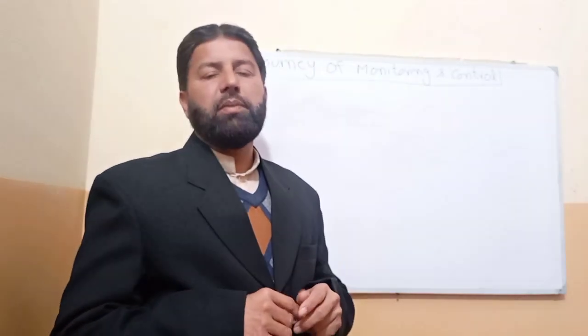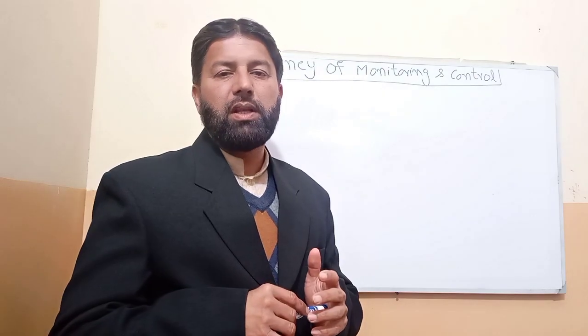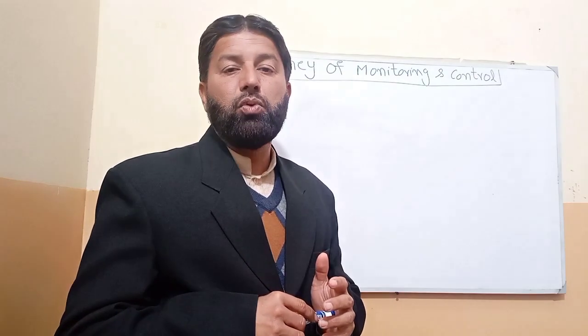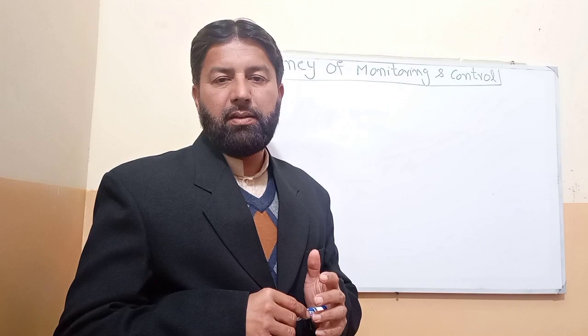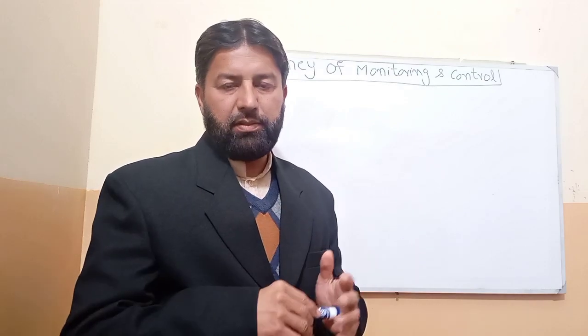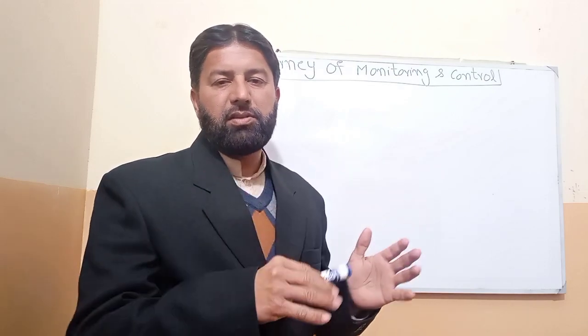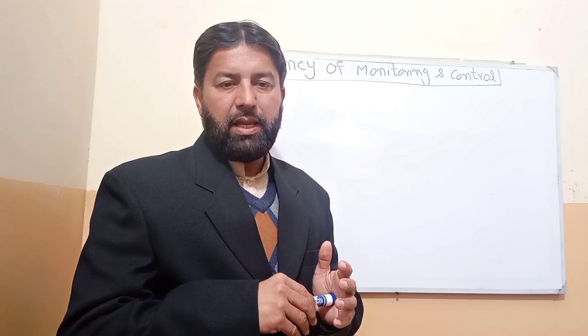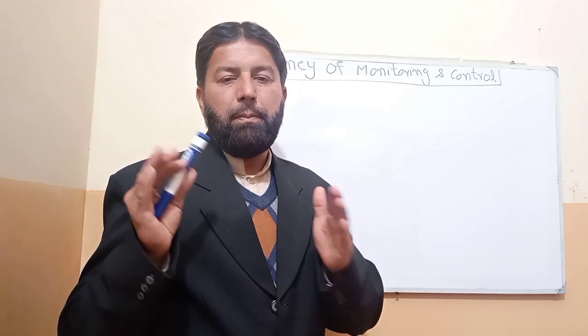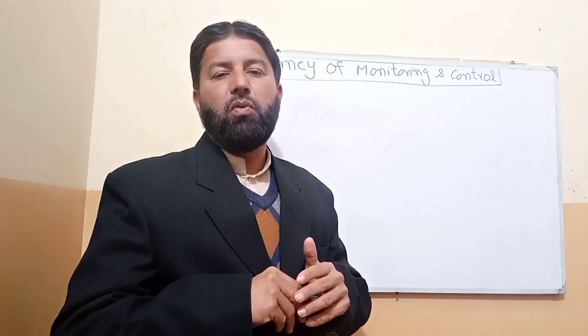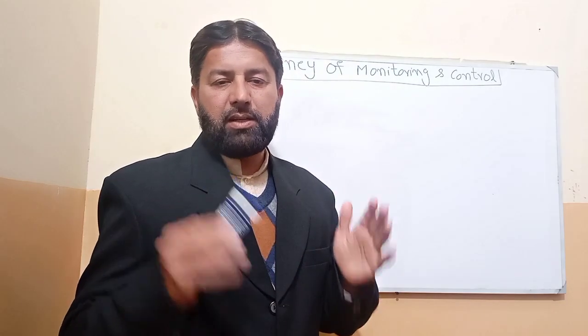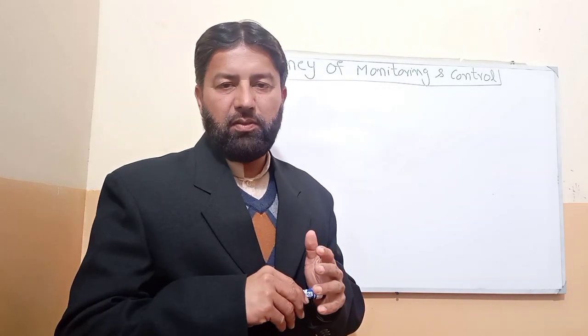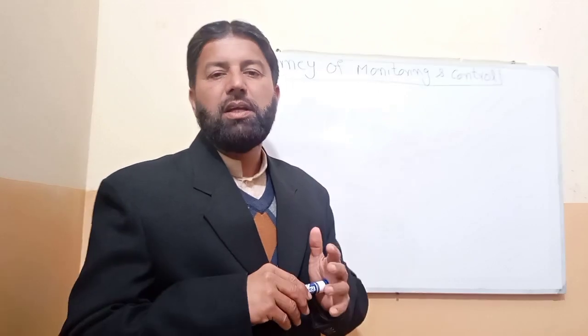What we will do in monitoring and control is compare the approved project management plan with the work we have done. Plan versus actual. And when we compare plan versus actual, what will we get? We will get variances. Variances are of different types.